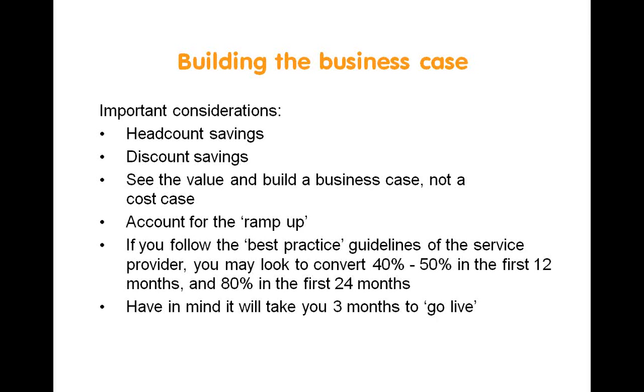What will have an even bigger impact on the business case is the discount savings that you'll be able to realise, and that's key. So do factor that in as well, and do work quite closely with procurement to make sure that you really are budgeting for the right amount of discounts. Do see it as a value case, a business case, not a cost case. So when all this work's been done internally, you haven't even gone to the market yet to see what's out there.